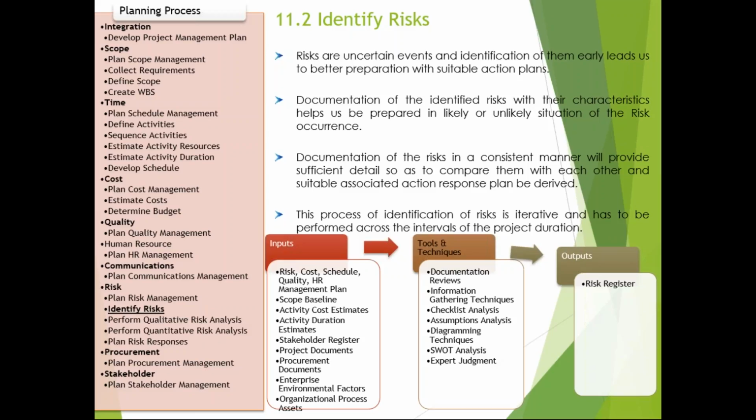That is checklist analysis. Assumption analysis: you might have different assumptions. For example, let's say the dollar value would not change beyond 5%. If that's my assumption and suddenly an event like Brexit comes up, which will have a higher impact, in that situation I need to analyze my assumptions and see whether they are still valid. Looking at that, do we have any other risks which can come up?